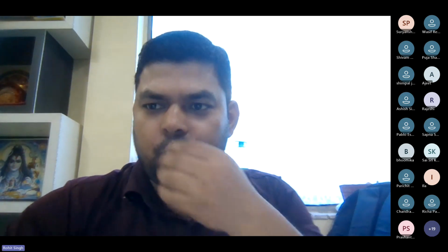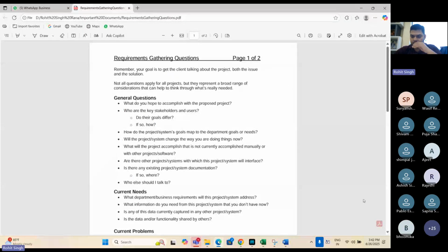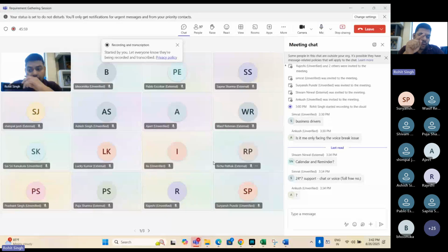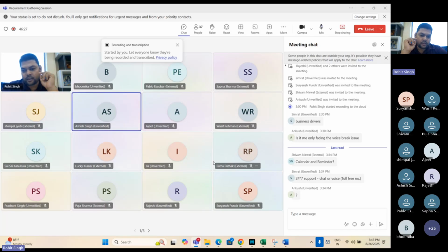The workflow which you mentioned: initially we will do the pre-sales requirement gathering, wherein we discuss the expectations, what the client is expecting at a high level and vague level. Once that is done and the client is onboarded, then as per the revised, incorporated and approved business requirement document, we will do the project planning. As per the project planning, we will do the product backlog management, where we create Jira cards. As per the product backlog, we will create the sprint backlog.